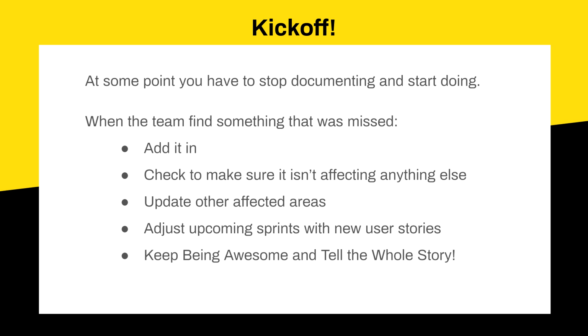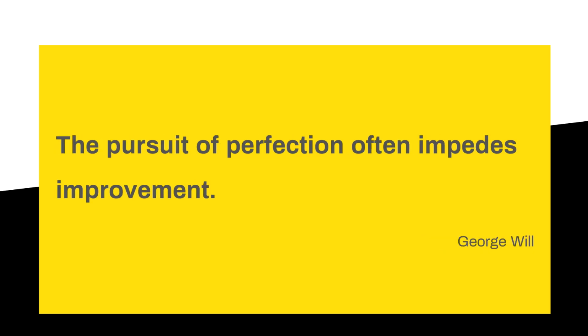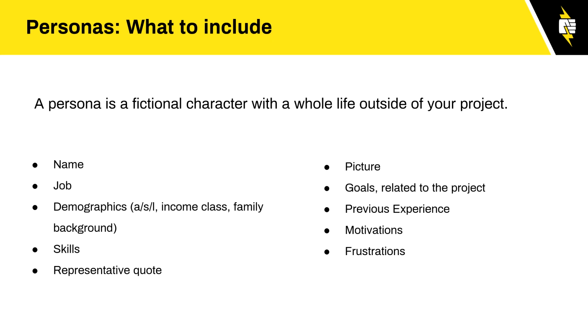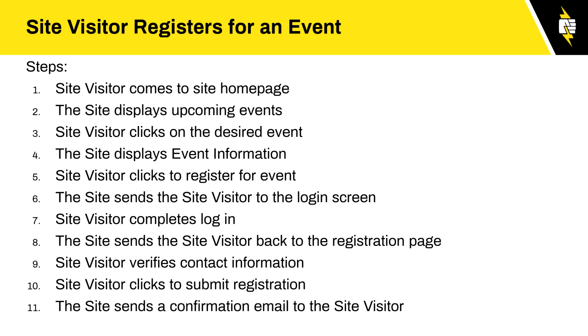A lot of times as the project manager, just flipping through these will pull out a lot of, but what happens if, but what if, but what if. So these are getting written, and you review them with the team before they're about to go write the user stories, right? If you go through this with the team and they're going to write the stories and then estimate them and everything, you can start raising the what-ifs at this point too.